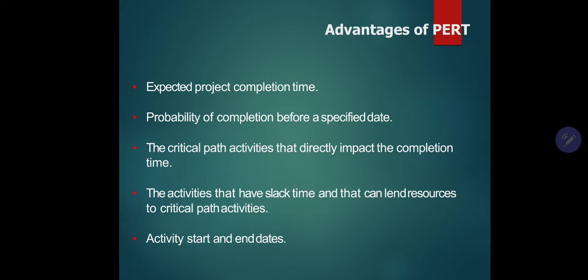What are the advantages of PERT? Advantages are: it gives expected project completion time, probability of completion before specified date, the critical path activities, the direct impact on completion time, activities that have slack time and can lend resources to critical path activities, and activity start and end dates.